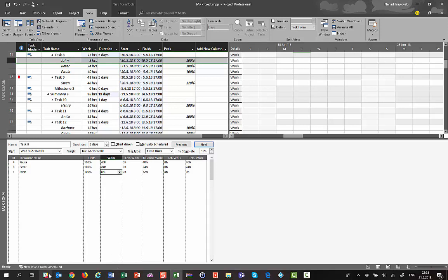He worked only 8 hours because he started on Wednesday and finished on Wednesday, so he spared a lot of time, exactly 32 hours minus 8 hours, which was really needed for this task. 32 minus 8, 24 hours. He spared 24 hours.